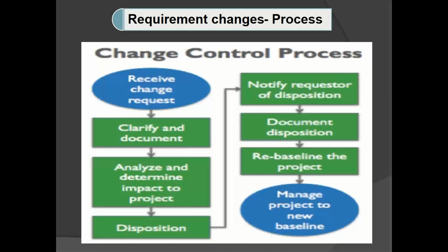Okay. So let me explain in practical how we are going to do. So first step is CRF. CRF stands for change request form. So please be noted, we are not going to do change request through oral communication. It is mandatory that we need to have written communication to do the change request.